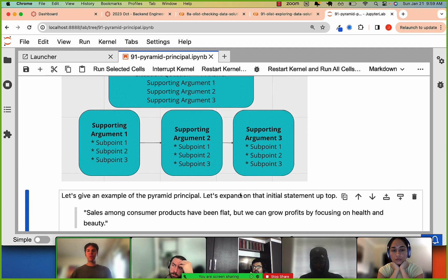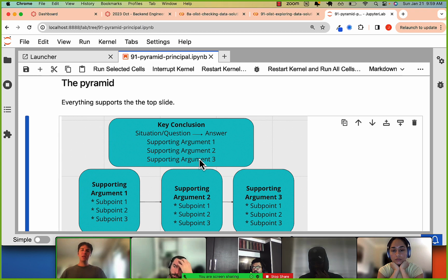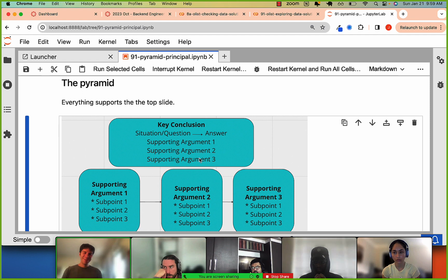And the other thing that's really helpful about it is that it allows you to show this project, show your results, show the end to team members, to your manager, to whoever, before it's even done. Very, very important. Why is that so important? Because typically what happens is you do a month's worth of work, and then you show it to your manager and the rest of the team, and they're like, wait, this isn't what I wanted, and two, it's wrong, right?